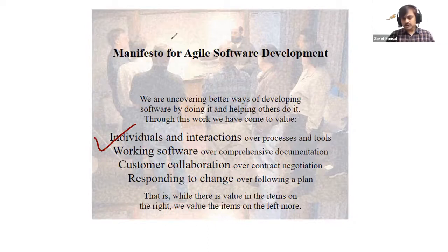Then they've also focused on, the manifesto was primarily written for the software space, so you see more software language here, that rather than progress being monitored based on some phase completion, like 10% work is complete, 30% work is complete, we should focus on deliverable completion, deliverables which are consumable. So rather than focusing on document-based completion, document-based progress, document-based conversation, we should start doing product deliverable-based conversation.